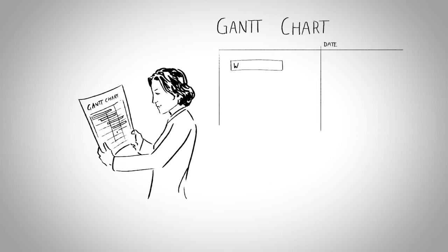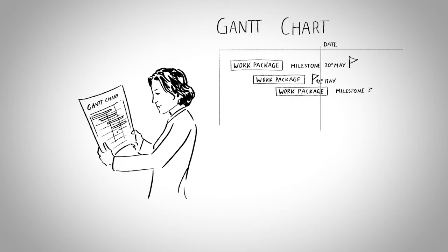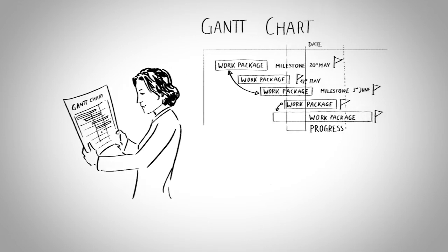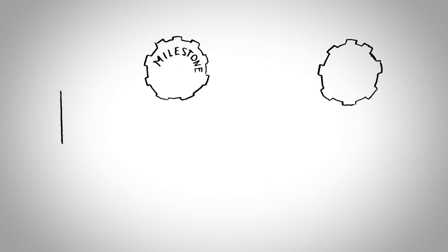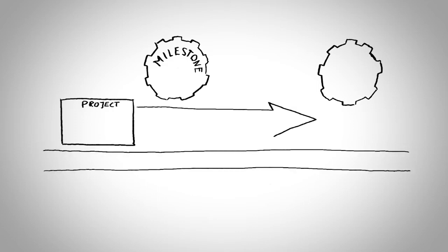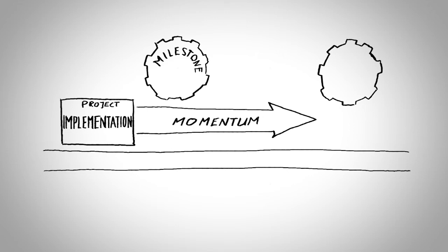This graphic illustrates the starting and ending date of milestones and key work packages of a project. Gantt charts can also show dependency between activities, current schedule status, and vertical progress lines. Setting and monitoring milestones are important for the successful management and coordination of a multi-stakeholder project. A milestone is a scheduled event signifying an important decision-making moment or the completion of a deliverable. Milestones can be used as project checkpoints to validate how the project is progressing, thus allowing proper monitoring of the project's implementation. The achievement of milestones can be utilised as opportunities to build and maintain momentum in the project.